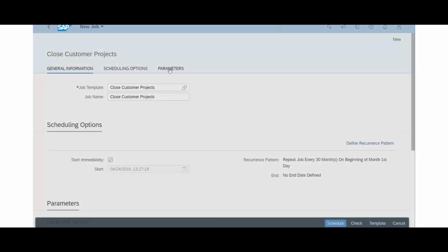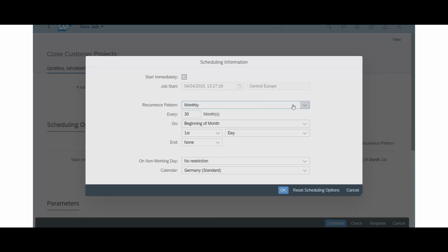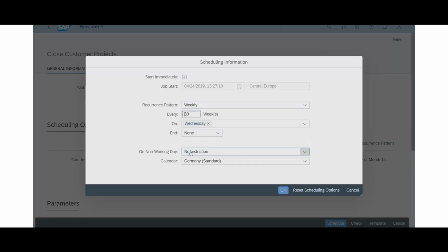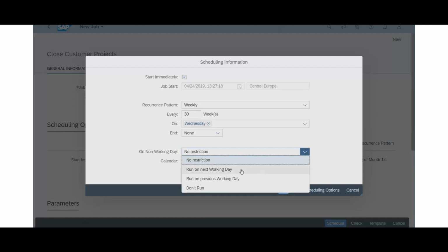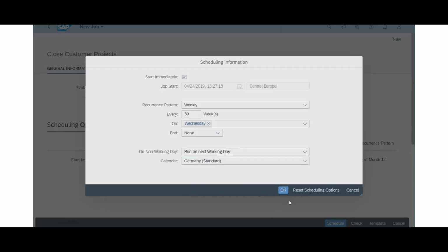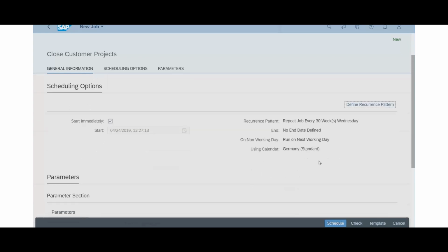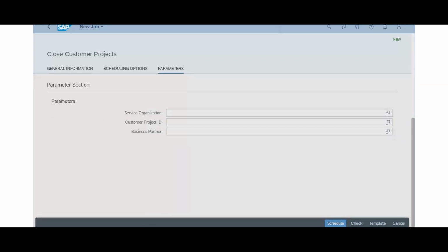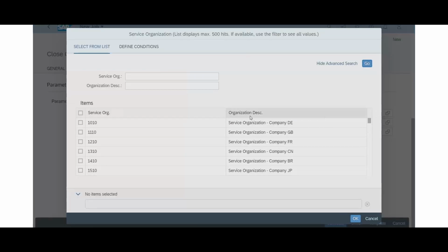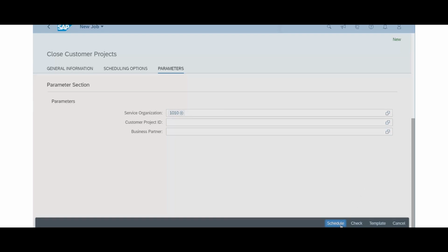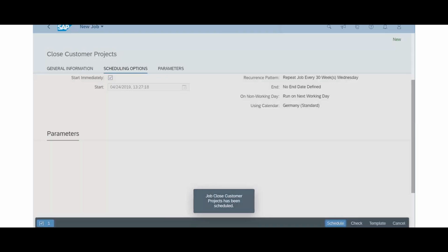We learned from our customers that often projects won't be closed due to the time needed to close them individually. Therefore, we now deliver this automatic job in the system, which will allow you to close all inactive projects automatically. This will help the project manager to keep track of all pending activities, such as missing time approvals, expense postings, and open invoices. This will help support in cleaning up the system data and ensure proper archival of inactive projects in your system.